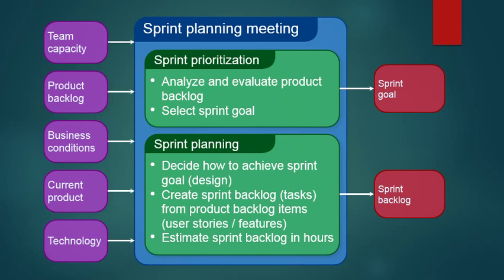In sprint planning, we decide how to achieve the sprint goal, design. Create sprint backlog tasks from product backlog items. User stories, features. Estimate the sprint backlog in hours. At the end we have the sprint backlog.